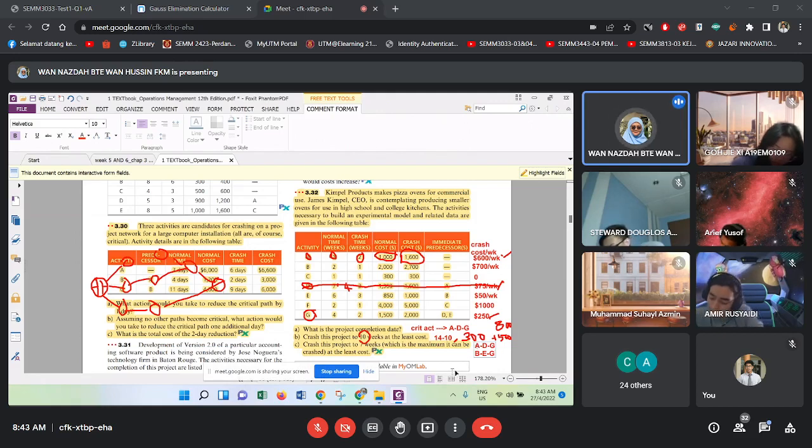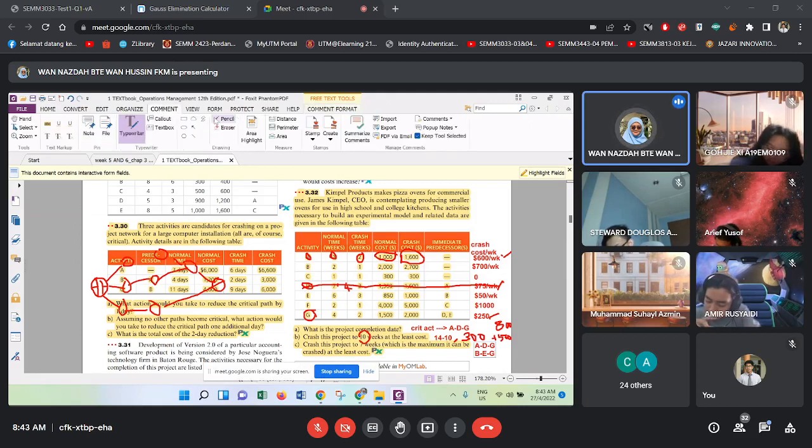All right. So now, based on your 10 weeks of completion time, what you need to do more is you need to crash to 7 weeks. So now your A, D, and G are considered critical activities. And as you can see, you consume all the crash time for activity G as well. So you cannot crash D and G anymore. So B, E considered as critical activities.